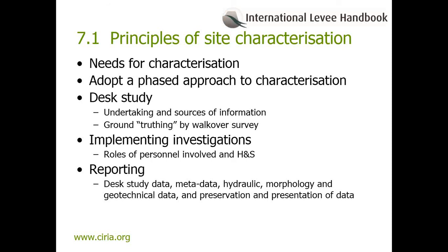Phased approach. Characterization is best undertaken in several phases, each phase leading to the collection of more data and a better appreciation of the site. It allows subsequent phases to be designed to target known issues.